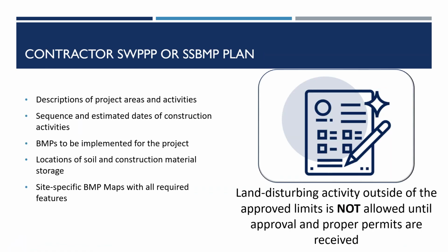Contractor SWIP, or SSBMP Plan. The contractor plays an essential role in understanding the means and methods, field conditions, and need for construction support areas. The contractor is responsible for edits to the SWIP or SSBMP plan initially drafted by the designer.